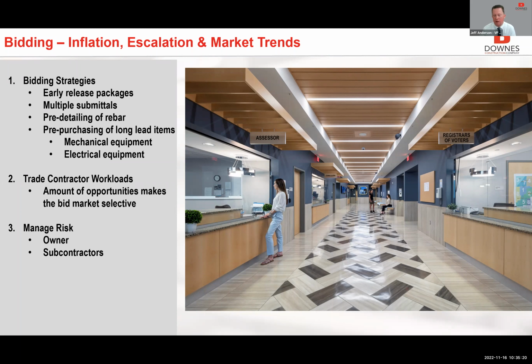We're looking at multiple submittals. So what that means is when we have contractors on board, and a particular flooring product has been specified, we ask them to submit an alternate flooring product at the same time, in case by the time we're ready to release the approval of that particular material, that material has a longer lead time or takes longer to get. We have a second option immediately to react to try to mitigate that as a delay to your project.